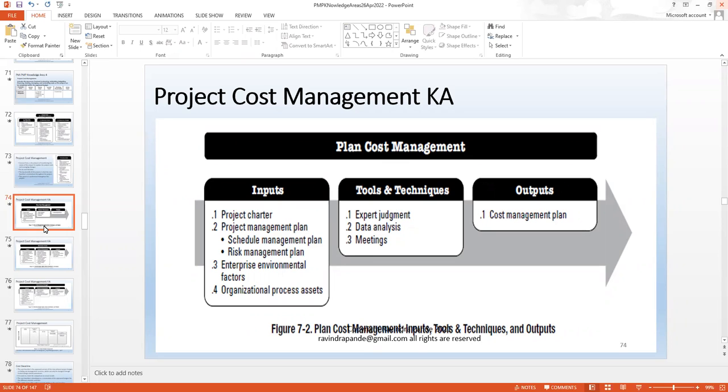But whatever you have been allocated in terms of human resources, man, material, machine, this is how we normally calculate our cost based on how we are utilizing it, till what time, from what time, and this gives a schedule and a related resource cost to us on almost daily basis. So in many of the organizations, the resources are billed at a flat rate. So if you get a senior or junior resource, it hardly matters. But of course, yes, senior resources are not that available.